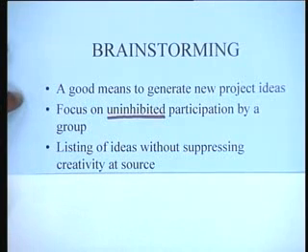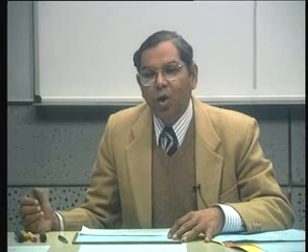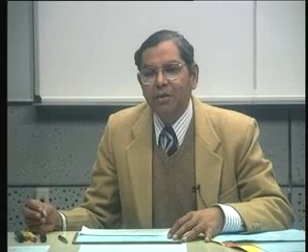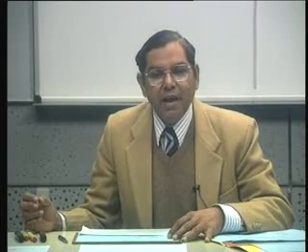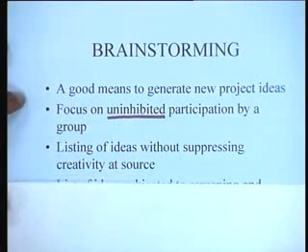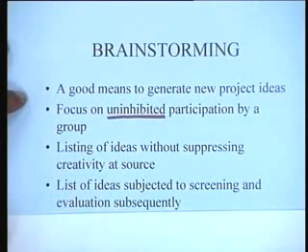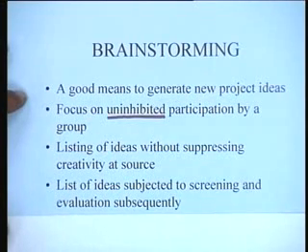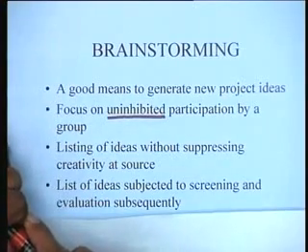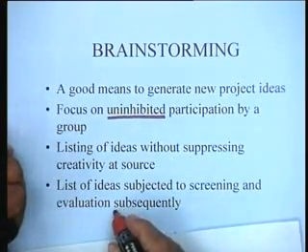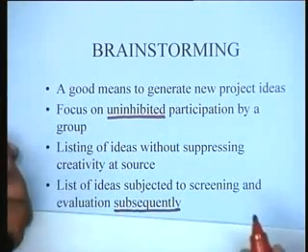So even if someone gives a silly or a stupid idea to begin with, the norm in brainstorming is to just record it and not to scoff at it or evaluate it at that stage, because that would in fact curb the creative urge in the individual. The list of ideas, once it is taken, is subjected to screening and evaluation subsequently. It's not evaluated there itself, but it is evaluated later. That is, I think, another point to be noted.